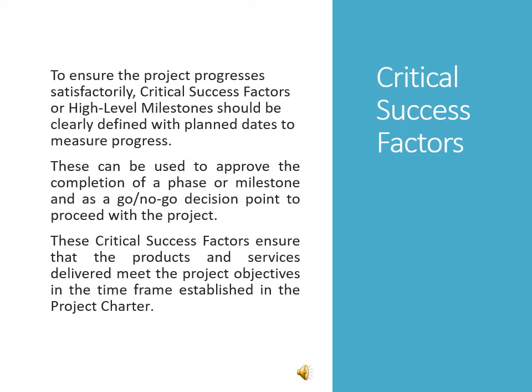Critical success factors which need to be highlighted. In fact, to ensure the project progresses satisfactorily, critical success factors or high-level milestones should be clearly defined with planned dates to measure progress, without which our project may be just a flop.